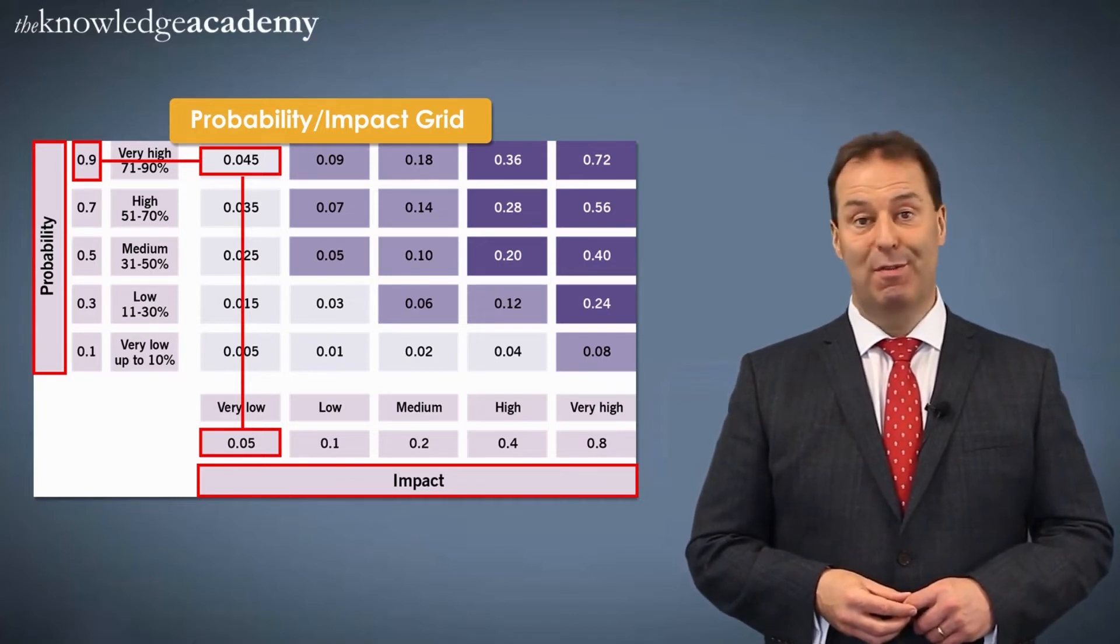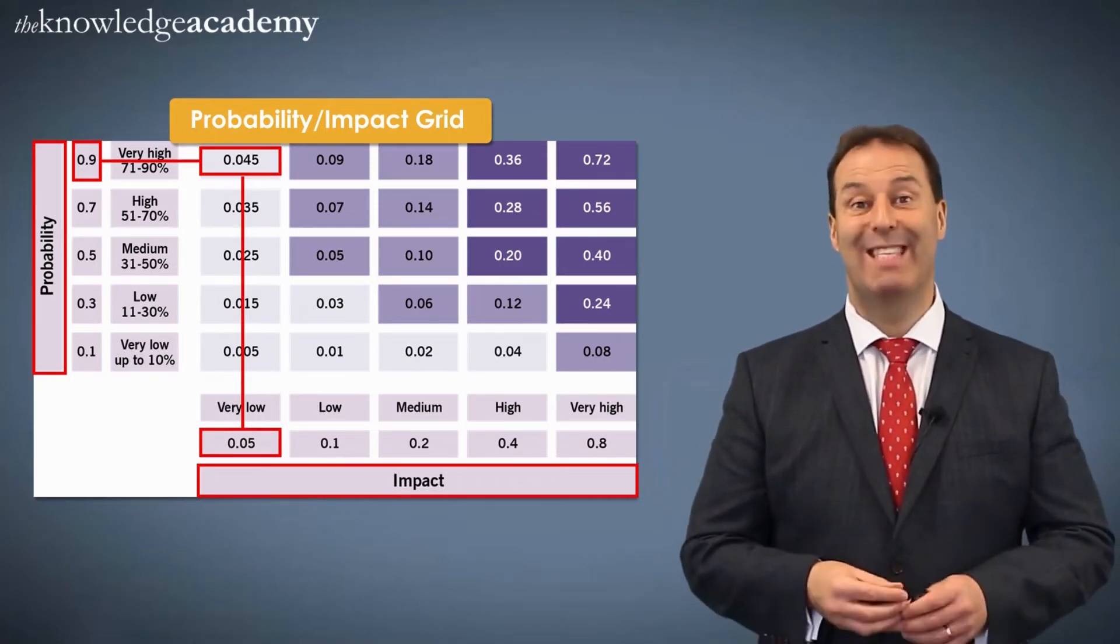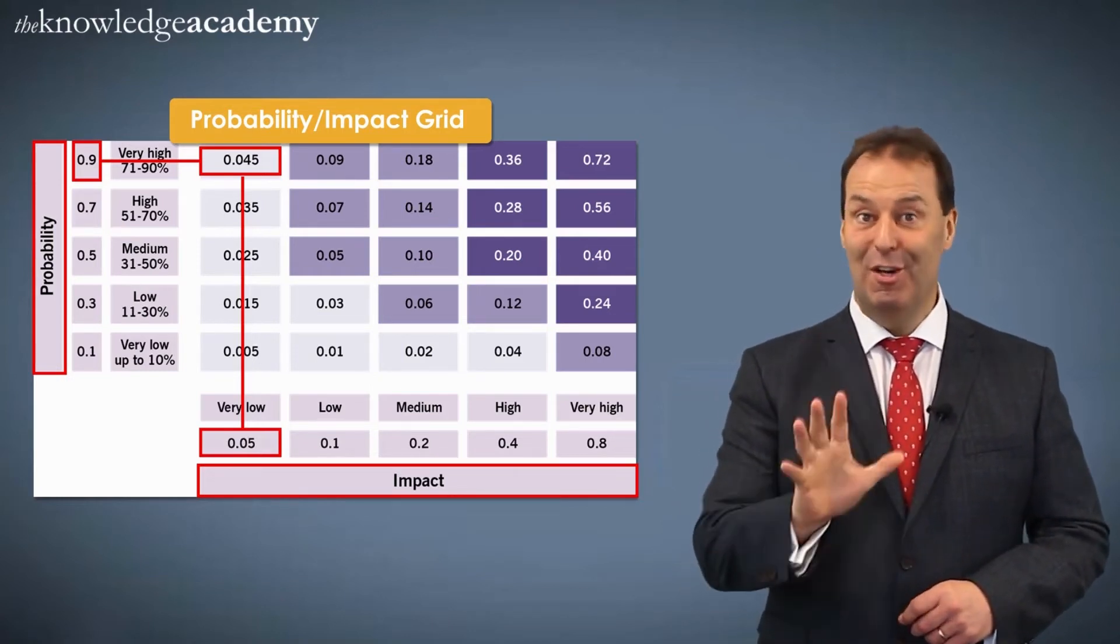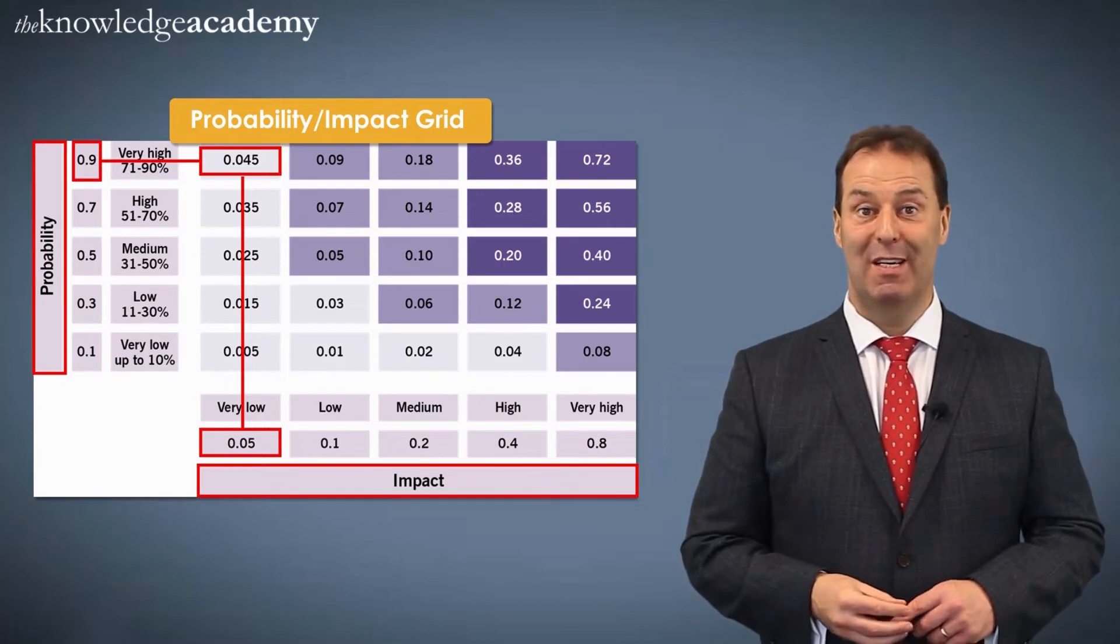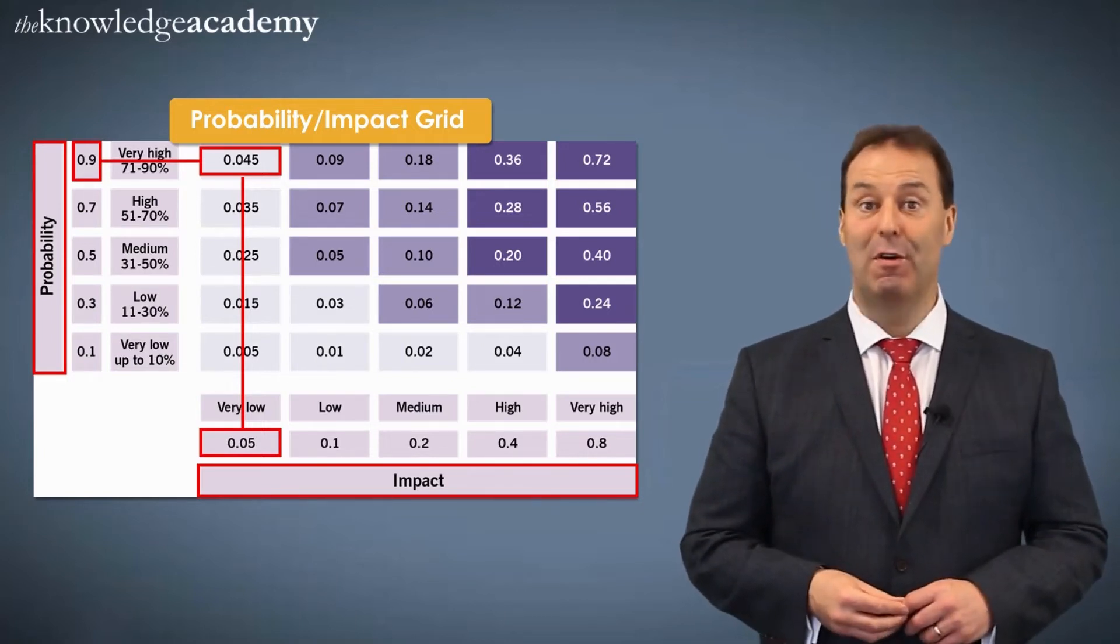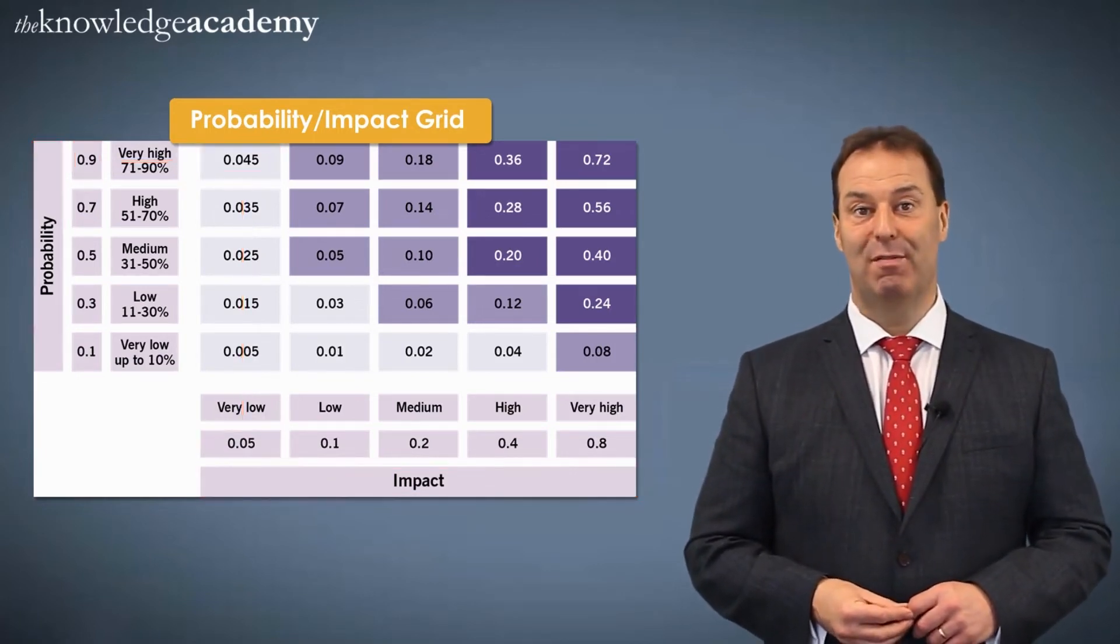It's a very useful tool and it's very good for helping me to assess the impacts of individual risks. The scales are not decided by the project manager. This will be a decision of the project board and often a reflection of the risk management structure in the actual organisation itself.